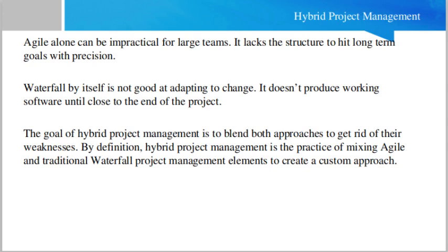The next approach nowadays which is very common is the agile approach. Agile means the iterative approach. Iterative means that the main focus is on customer feedback. We do the project management of software development by getting feedback, and an iteration based approach is there. For example, if there are 40 tasks in a project, let's suppose, we divide the project into multiple chunks, where each chunk or sprint will contain 10 tasks, and with each sprint or each iteration we complete the tasks step by step, okay. And we can go back, we accommodate the changes, we do the collaboration.